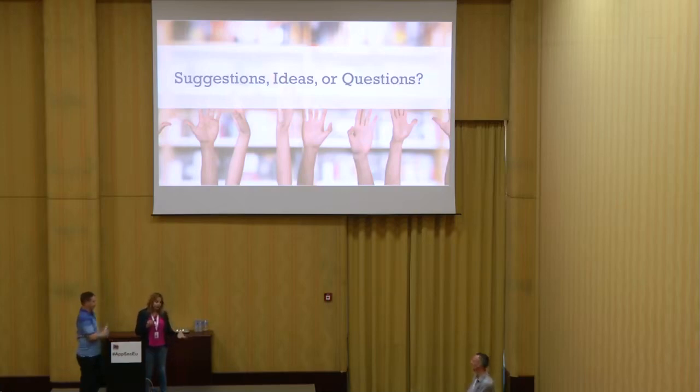So what we do is we actually put them in the backlog. We're getting really good about that. But if they are an emergency, you have to prioritize. You know that, okay, this story may not get done, and we push that one in. So there are times we've done that as well.